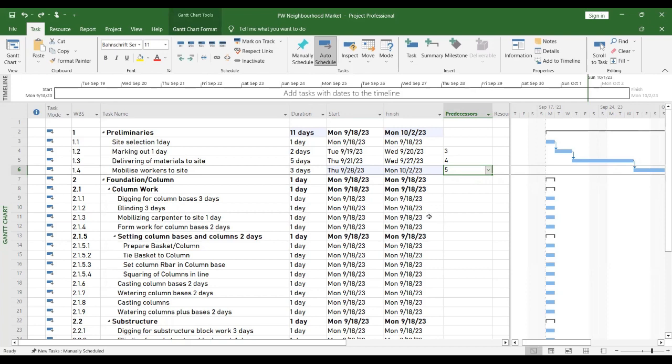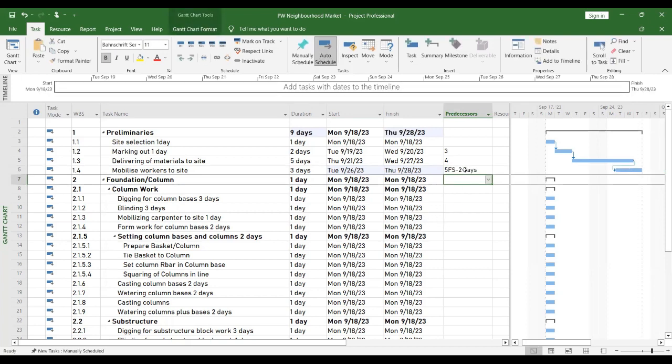Now, because I have applied a lead, maybe your clients come and tell you, no, October is too late. I have applied 2 days lead. I now start September 26. It is ending September 28, right? Actually ending on the day it should have started.